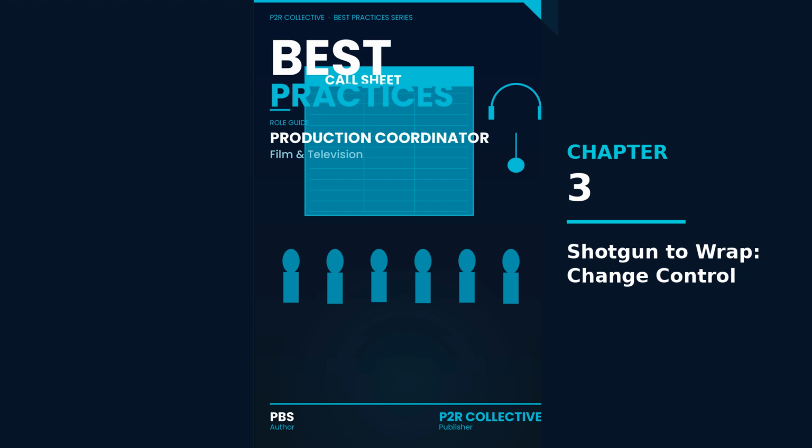7. Verify receipt, 2:35 to 2:45 p.m. Priya asks for a reply OK from AD and locations for the updated call and location window. She checks that the VFX team knows they're not starting at 5 p.m. Expected outcomes: crew arrives at the correct time for the swap, 3:30 p.m., instead of waiting on a clean plate that can't start. Your shot tracking stays honest. You never count scene 12 or scene 14 as done when they're held or blocked. Tomorrow's plan doesn't collapse because you protected the status rules and versioned your schedule truth.